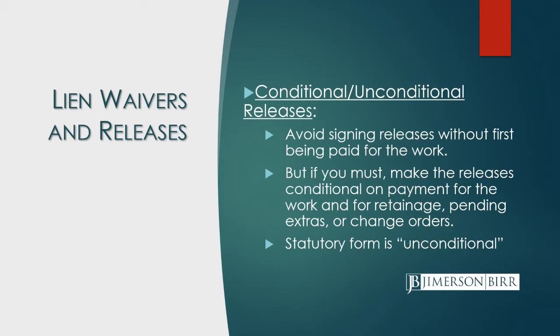And of note there, the Florida statutes has forms for lien releases. And the form has been determined by courts to be unconditional. There's some language in the statutory form that some subs and suppliers read to make it conditional, but it is in fact not.